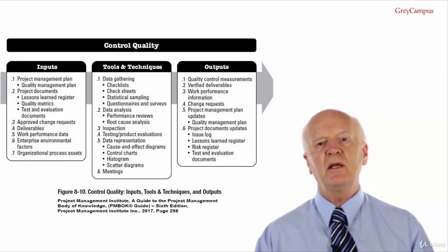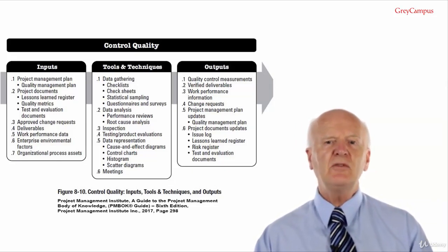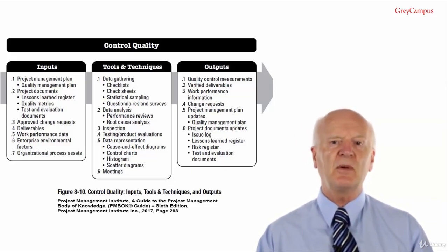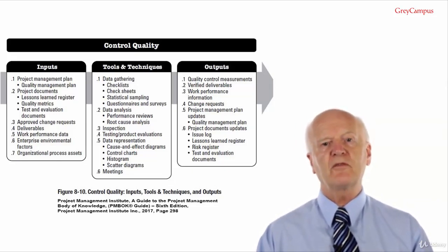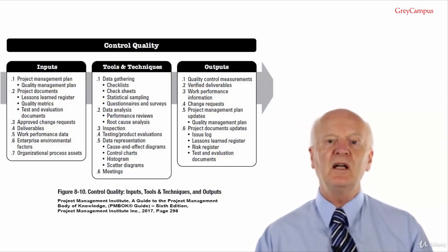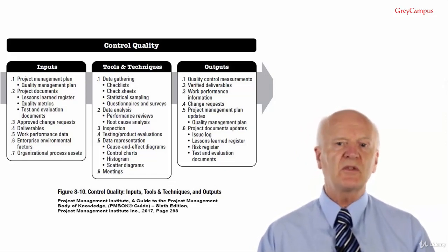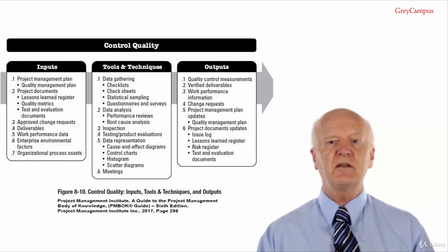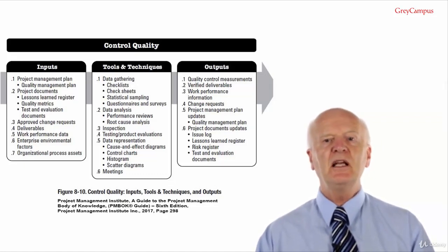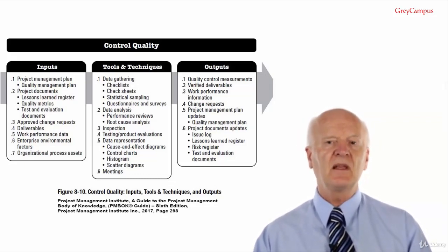Control charts may be used to monitor various types of output variables, although used most frequently to track repetitive activities required for producing manufactured lots. Control charts may also be used to monitor cost and schedule variances, volume, frequency of scope changes or other management results to help determine if the project management processes are in control.